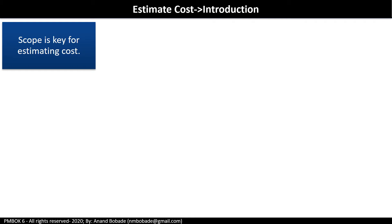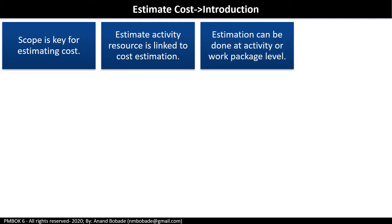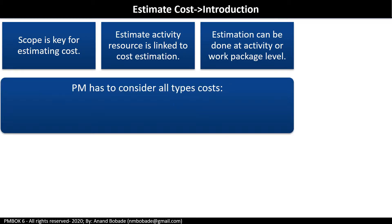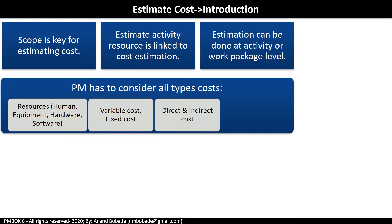Scope is key for estimating cost. Scope is translated into action in the form of activities, done in the define activities and sequence activities processes in schedule management. This is the starting point for the estimate cost process, whose main purpose is to take activities from the activity list and estimate their individual cost. Estimate activity resources links to cost estimation as the type and quantity of resources is a key input. Estimation can be done at the activity level or at the work package level. The project manager has to consider all types of cost, including resource costs — human resources, equipment, hardware, software — variable or fixed cost.